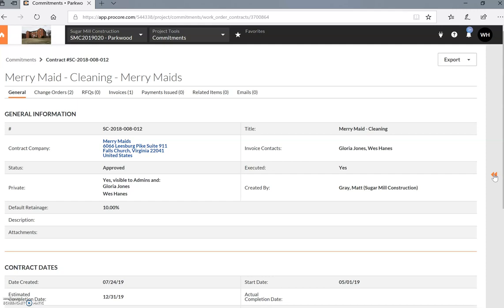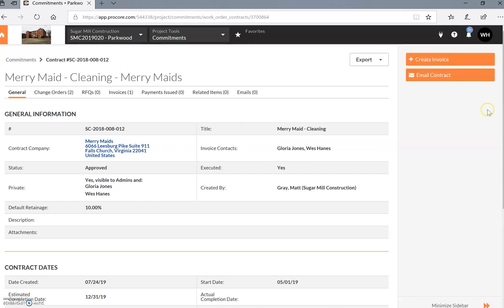After you create the invoice, that will come to us automatically. You have to do nothing. We'll review it. Once it's approved, then a partial release of lien will occur. First thing is you're going to go over here in the right-hand column to create the invoice.